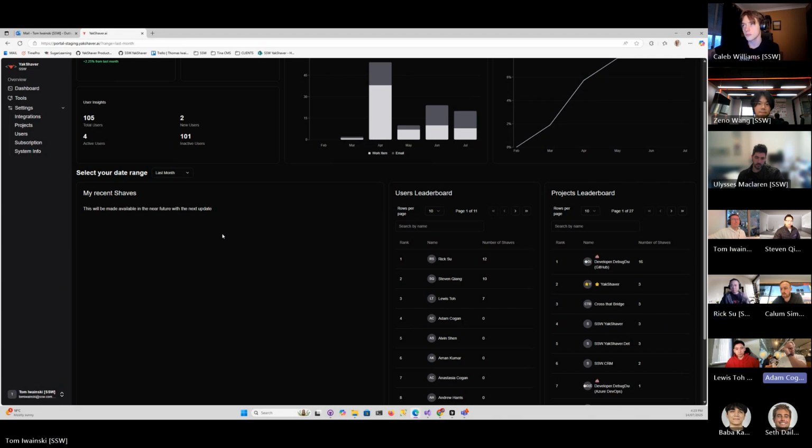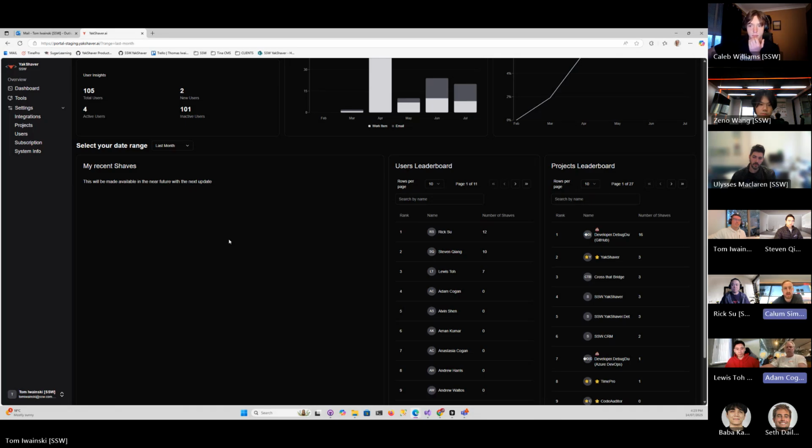Just one thing. I could be wrong, but I don't think this is completed and deployed, right? This is currently on staging. So this is not complete as far as Scrum cares. You would not include this in the sprint review until you finish going through all the things that have been done and deployed and are in the increment. These are optional. We're finished with a lot of stuff that's done, and we're just giving a quick update on this. That's why we're mentioning it. Oh, I see. Okay. Maybe we could have made that a bit clearer.